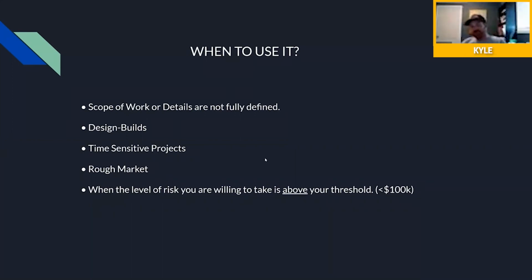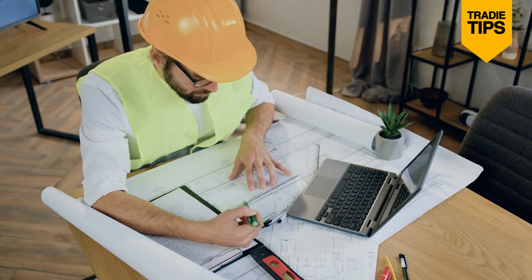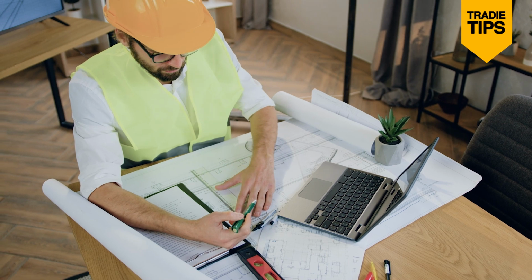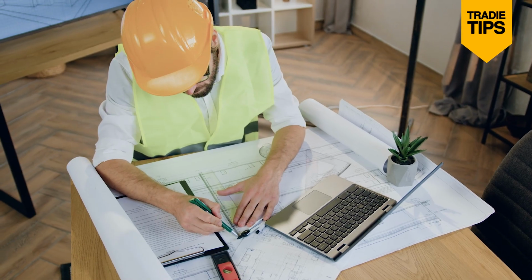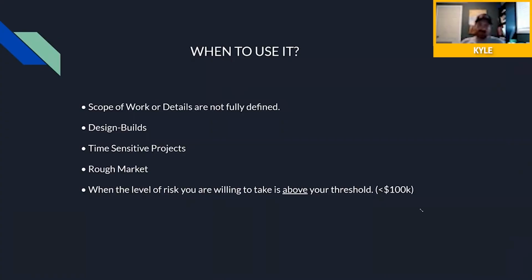We've just amalgamated more of a design build feature, where we used to be a lot of design bid, where you've got designers doing drawings for the homeowners, and then the homeowners send these drawings out to multiple different contractors, so we're all bidding it, trying to get the job. Whereas design build is where the client comes to you, you secure the designer that fits best for their style, and then you work with them towards their project, with their budget in mind. You bring it all together to have an outcome of doing their project.